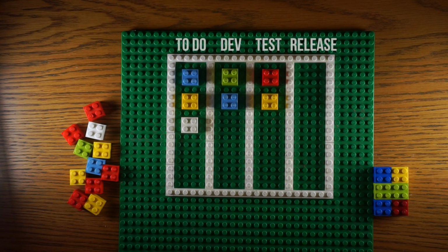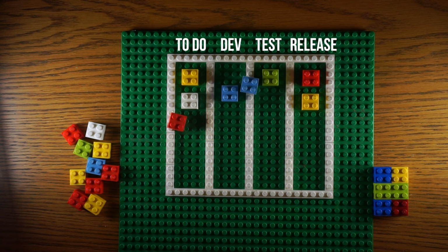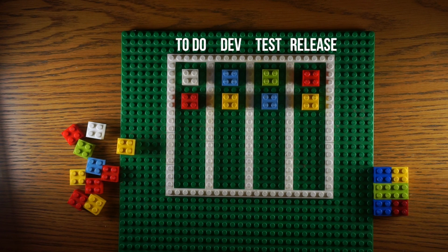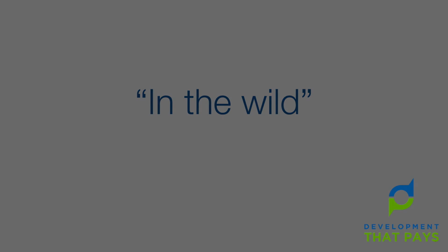A Kanban board, on the other hand, has a different shape. It doesn't have the periodic property that the Scrum board would have. Cards move across the board in a more or less continuous fashion. When we go spotting Agile boards in the wild, we won't be able to see them in motion, so let's just check that we can identify snapshots.